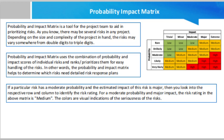All these methods, though beneficial for management, have their limitations and drawbacks. Risk management is a four-stage process: first, identification of risk; second, analysis and assessment; third, risk response; and finally, risk monitoring. In the analysis stage, risks identified during the identification process can be prioritized based on determined probability and impact using qualitative or quantitative methods. Other factors such as response time frame and tolerance should also be taken into account. Impacts are often defined as the consequences or effects of a risk event on the project objectives.